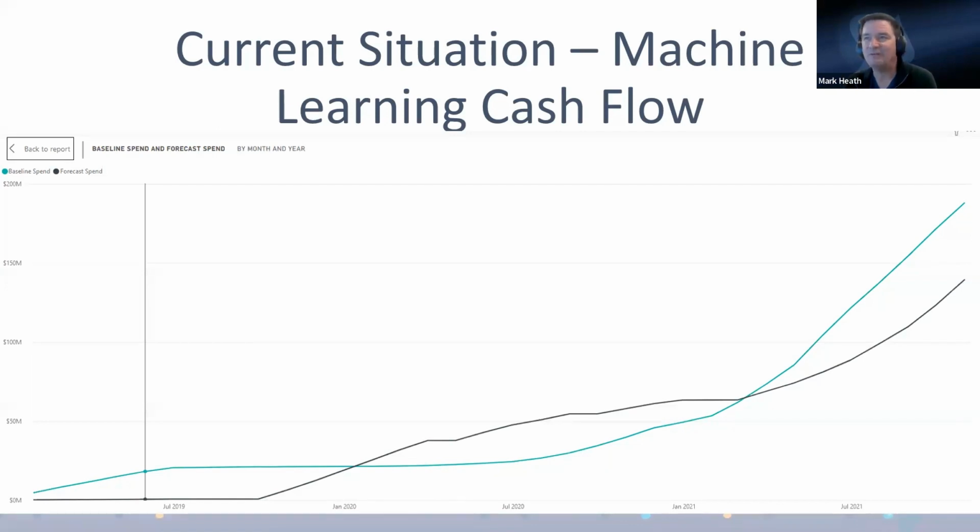At the moment, you need to put in the timeline. That'll be a change coming where it'll say it'll take 18 months and it'll take this kind of cost profile. And if you've already done the predictive estimate, which we're building as well, the parametric estimate, then that'll feed into that. So parametric estimates of the floor area and the floor to wall ratio and all these other things will go into the parametric estimate. That'll feed into the cash flow profile and the timeline that you can present back to the developer and say, here's what you need to take to your bank.